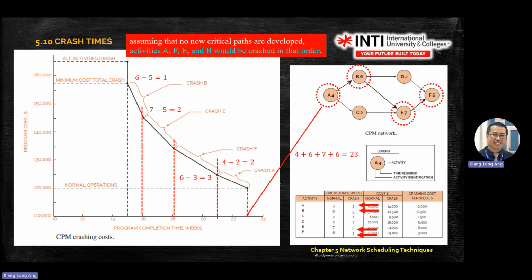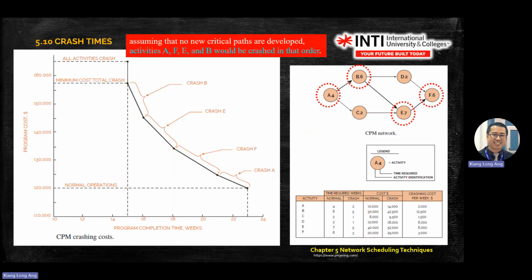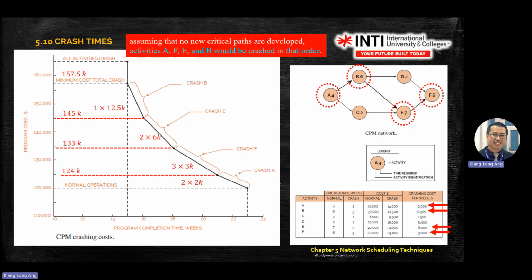You add up here. Then you tell the investor the maximum, the bad luck, is 165, and the minimum is here. So you need to calculate what is the value you need. 2K and so on. So 115.7K is your minimum cost if all the critical parts crash. Make sense?